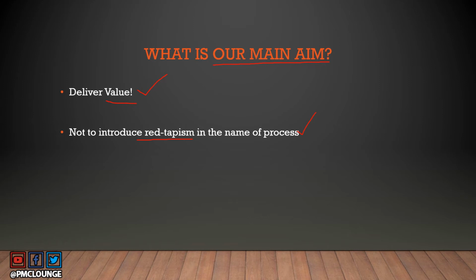Just because you are working on a 30-day sprint, and on the 20th day you have an escalation to deal with, and your Scrum team should ideally be looking into that escalation, that issue, you should not talk about process. You should not say, hey, it's just the 20th day of the sprint, let's reach the 30-day milestone of the sprint, complete this sprint, and then look into that issue.